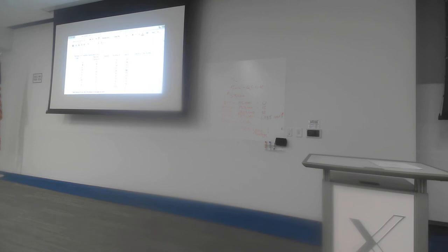Because I need to peel back the actual project day by day because of the nature of the changing critical paths to keep track of it, I need to keep a track of exactly how much it's going to cost me to crash each activity by a single day, rather than this idea of having just this, well, it's going to cost me an extra €20 to crash it by 4 days.